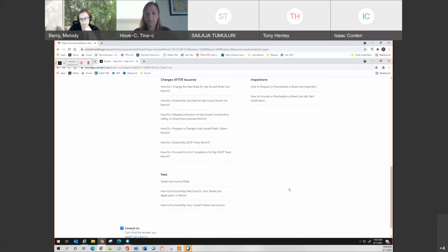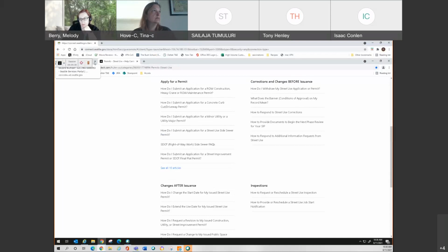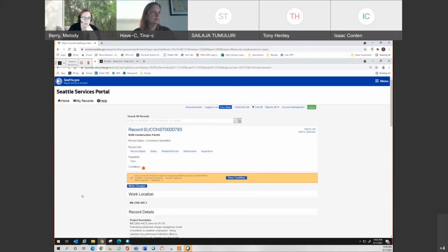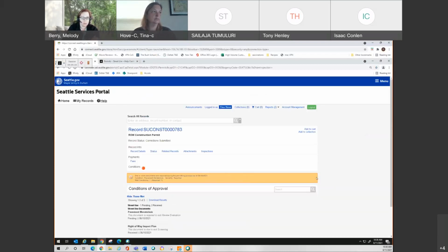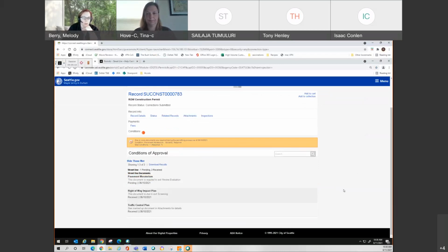Thank you. Thanks, Tina. A couple of things. There's a question on when it would be appropriate to upload the corrections response. Just a reminder that the corrections document is the street use comment sheet that Tina brought up earlier. If the reviewer wanted your responses, they would have added a condition called corrections response. That's when you would upload the street use comment sheet with your responses on it. And to Jason's point, please convert that to a flattened PDF before you upload.